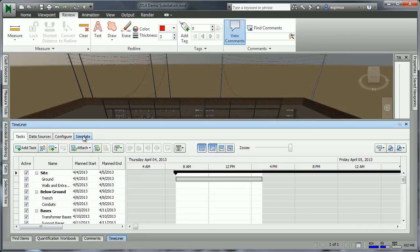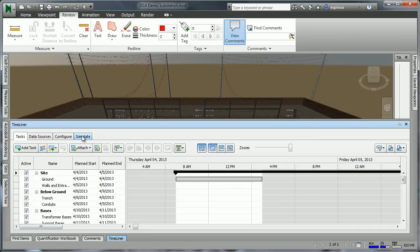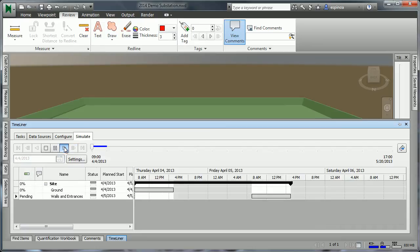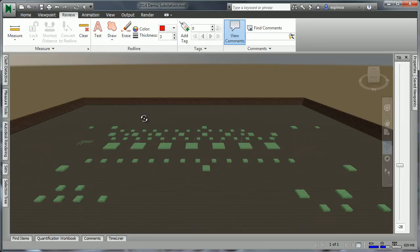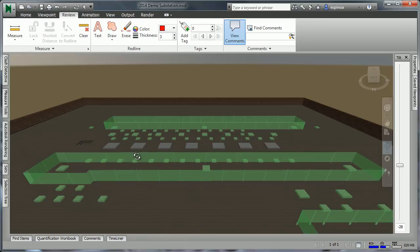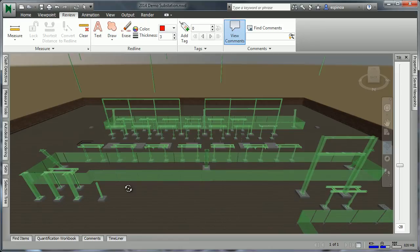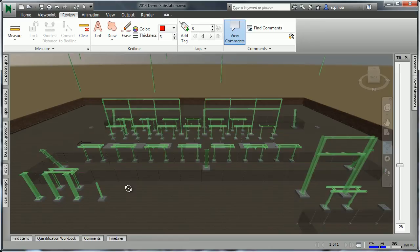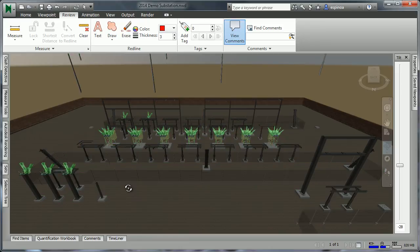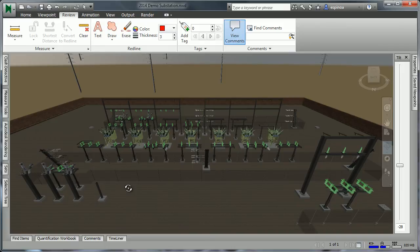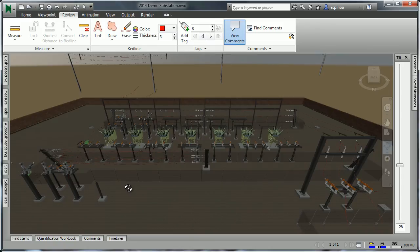At this point, we can go to the Simulate tab within this window and begin the simulation. What we'll notice is that items may be shaded of green. These are as they're being constructed. Once they're constructed, they will become fully solid. Also possible would be the ability to show deconstruction or removals. So we're seeing the project being built as it would be per a construction schedule.